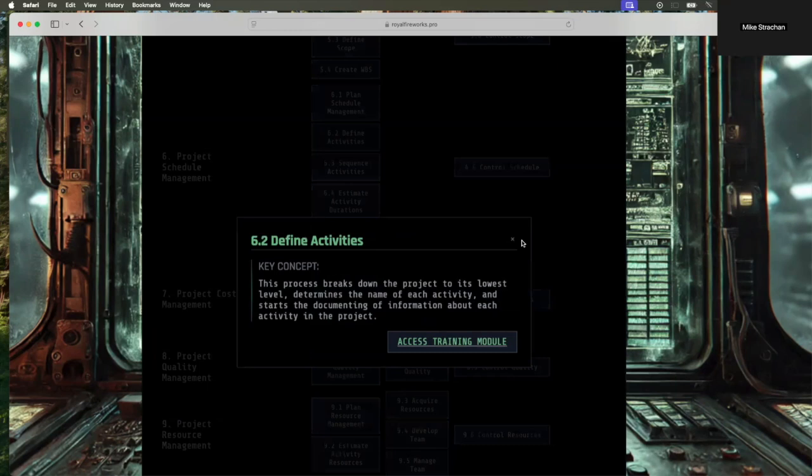That's where the project manager is decomposing the work to its smallest components. And that could be the activity level. On test day, it will be the activity level. Right? So we'll document information about each activity on activity attributes and then save it according to the plan. Otherwise, it becomes a soup sandwich because there's thousands of activities.